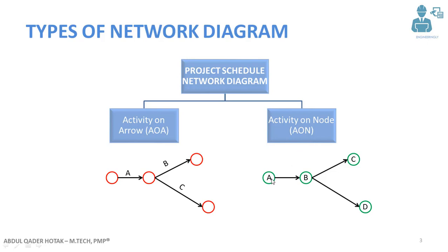In activity on node, the activity and the related information are shown in the nodes. As you can see here, activity A is shown in node A, and B, C, and D similarly. The length of the arrow has nothing to do with the duration of the activity — it only represents the relationship between the two activities.